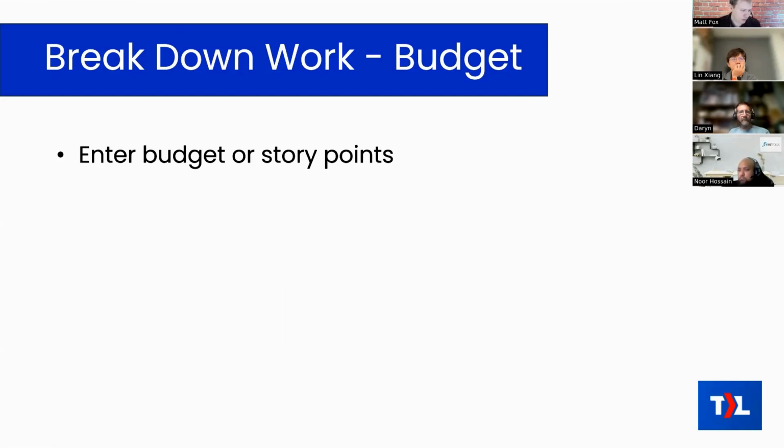The reason that we set the budget or story points, I'll explain that if you haven't heard about it, is because it helps us to estimate capacity and then set the priority. Because I think you mentioned, we need to know how much work we're going to be able to do this week, or how many tickets is it realistic for us to get through this week. So you need some sort of budget to begin to estimate that. Also to set the priority, because sometimes you're happy to just get through a bunch of small, simple tickets before you start on the bigger ones, especially if the smaller tickets provide some real value to the user. Then yeah, go ahead and get the small tickets done first. And you have to put in the budget so that you know which ones are the small tickets. So that's a couple of reasons that we do that.